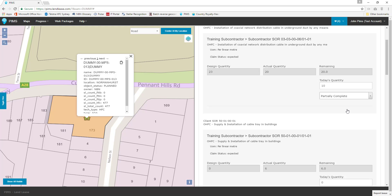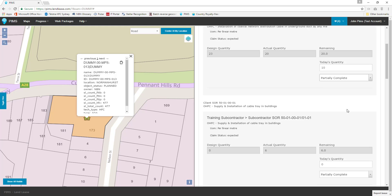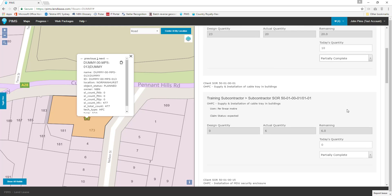The next work task on our list is the installation of 6 meters of cable tray. Let's report that we have installed all 6 meters. Because the number we have entered in today's quantity equals the remaining work total, PIMS has automatically set our work status to task complete.